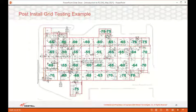This assures that the radio signal is being distributed throughout the building and to the levels as expected by the design. Once you're sure it'll pass and the installation has been cleaned up, the cable's tied down, everything's labeled, you're ready to call in the inspector. Good luck. And oh, by the way, don't leave the BDA powered up and operating. It's illegal to be passing a radio network's RF signals without getting permission first. And you want to be sure you're not going to cause interference.